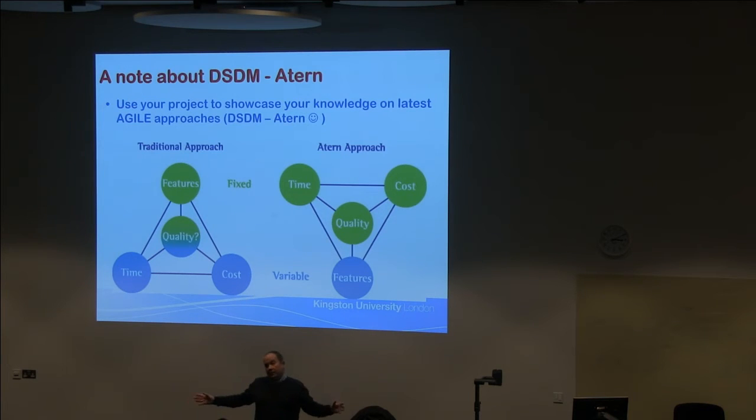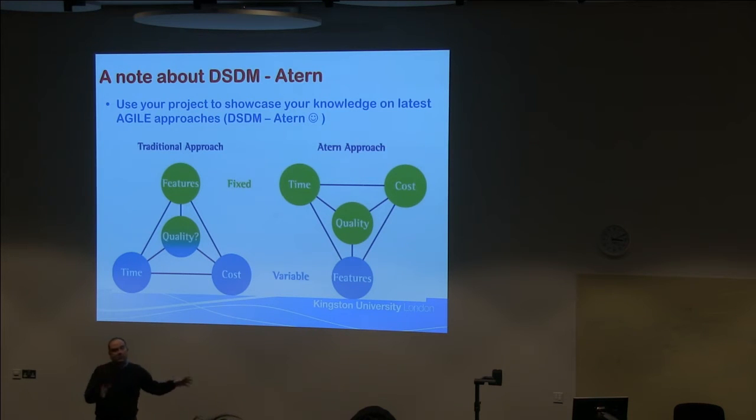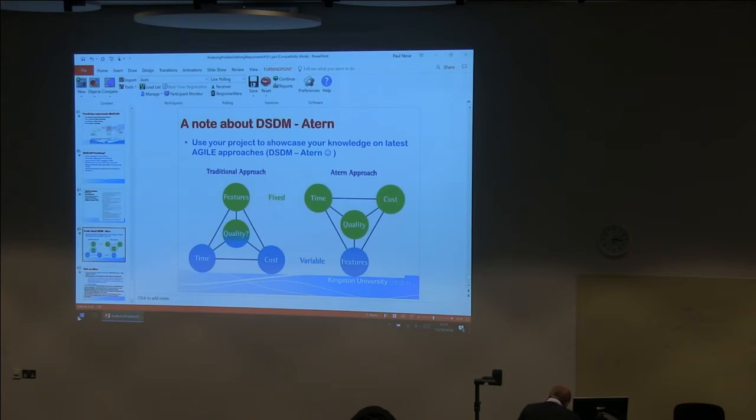By no means complete. Tiny bit of functionality, but that in its own right ideally gives business benefit. And then that is shown to end users and stakeholders, and they feed into the next cycle. And so at each iteration, the stakeholders actually can be involved. There is something called the Agile Manifesto.